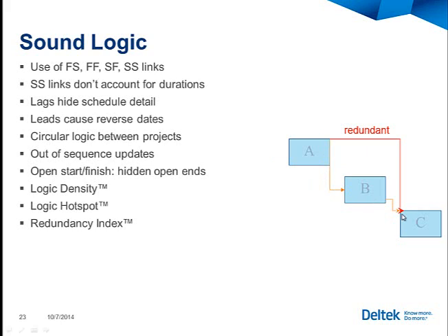Well, if I'm going from here to here to here, does that mean I can go here too, or do I need to do both, or do I need this redundant link in here, or maybe I didn't need this logic? Why do I have it represented twice? Or did the team have the planning background to be able to sequence these activities, since I'm seeing multiple paths to the same destination? Do we really know what we're building here? That's a more fundamental question.